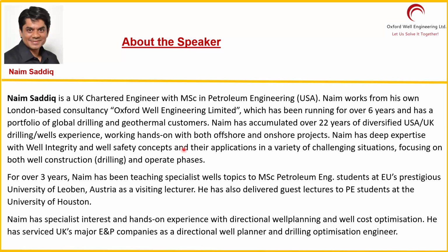In some companies, people have spent a lot of time optimizing these. When I moved there the first time, I talked to these guys, and I was quite surprised. I said, why would we have Rev A, Rev B, all the way to Rev Z of the plan? Why do we keep iterating the trajectories? And they just laughed at me because I was new. And then I realized that at every iteration, they had improved something related to the cost or optimization for deliverability. So this kind of iteration, you can do it every day.